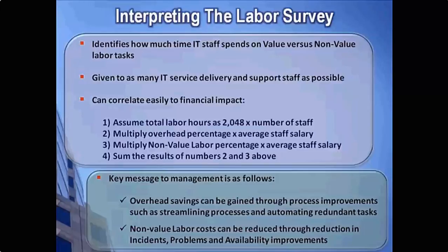It takes only 5 minutes to do on the part of anybody, and it simply identifies typical IT activities and asks them to put a rough cut percentage of time that they think they spend in these different areas. And then under the covers it helps you determine which of those activities are really unplanned activities and which are really value activities. So a very good survey to use, and one I would highly recommend when you're trying to put a return on investment together, because you can easily translate that percentage of labor into hours, then into salaries, and then into dollars, and get very quick numbers for what the company's spending on things like that.